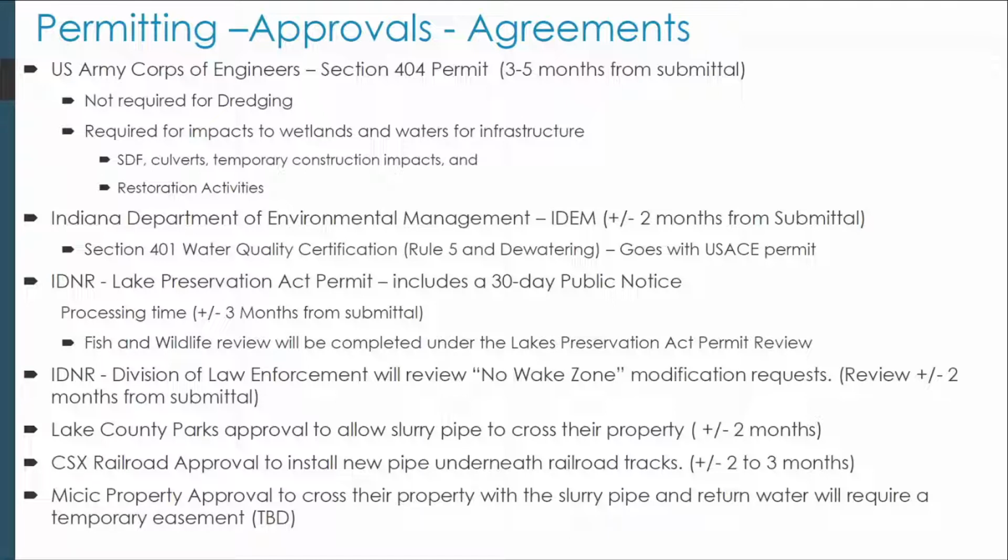IDNR is going to review this project under one permit package called the Lakes Preservation Act. They're going to lump a bunch of reviews under this one application for their ease, interdepartmentally, and for our ease of just preparing one package. And that package will also include a review for Fish and Wildlife. IDNR Division of Enforcement will be the ones that review if there are proposed changes for the no-wake zone signage in the lake. If that proceeds, they would do that review outside of the Lakes Preservation Act review though.